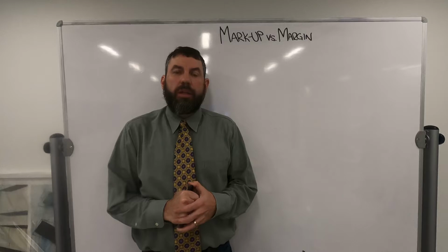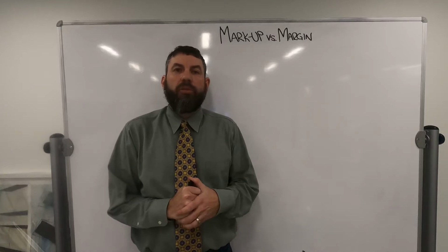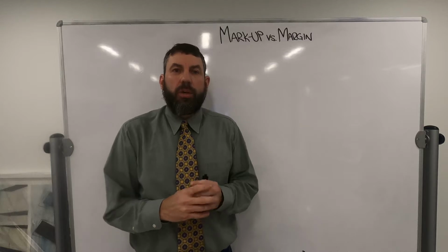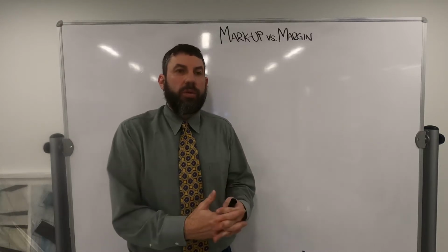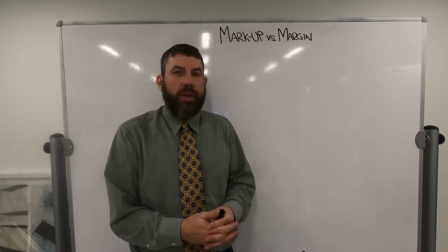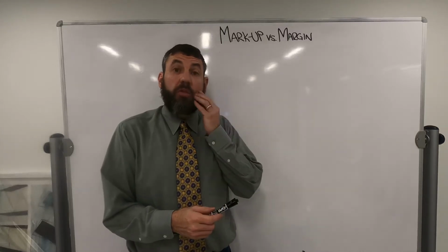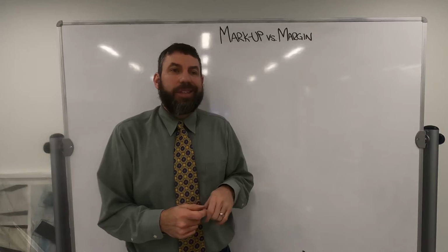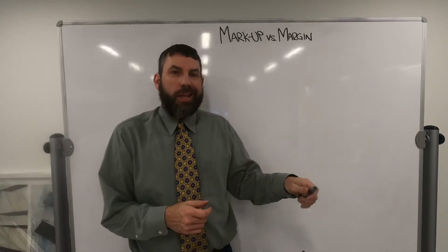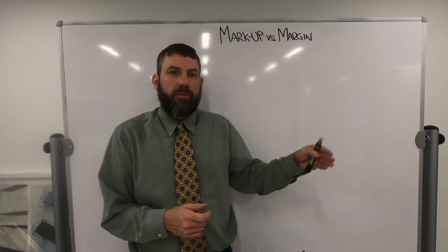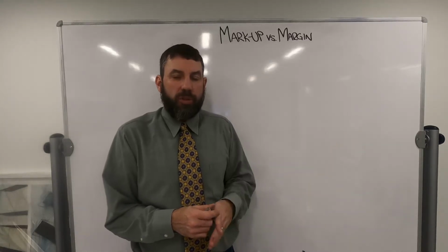I am Barry Wiley. Today, we're going to talk about markup versus margin. This is a number that sometimes gets confused. I know in scenarios when I talk about a change order with someone, I said, hey, what's the margin on that? And they go 30%. And I'm like, oh, we're going to make 30% on that. It's fairly good. But realistically, what they did is they took the costs and added 33% on top of that. So that's a big disconnection between markup versus margin.